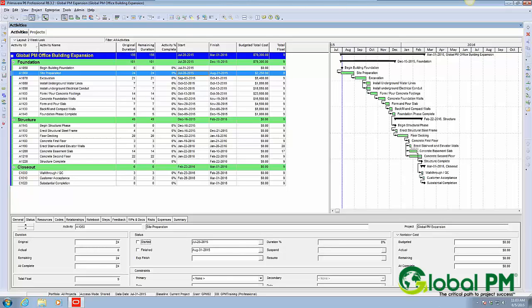One of them is total float is equal to zero, so it displays all critical activities as those that have zero total float.